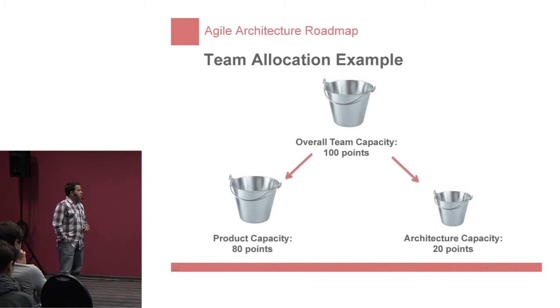And in terms of fitting that into our Agile process, the way we do it is at the organization level. We understand that we can do only so much with the development team. Today we have 3 development teams, 2 in North America, 1 in Poland. And we know our capacity, so we can do 100 points per release. And from those 100 points, today we're doing 100 points of product stories.